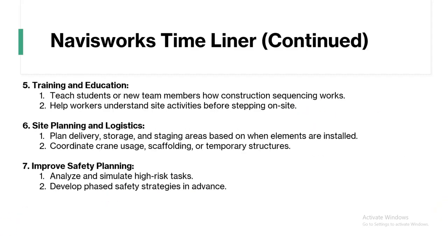The next benefit of Navisworks Timeliner is training and education. Teach students or new team members how construction sequencing works. Help workers understand site activities before stepping on site. Next one is site planning and logistics. Plan delivery, storage, and staging areas based on when elements are installed. Coordinate crane usage, scaffolding, or temporary structures.